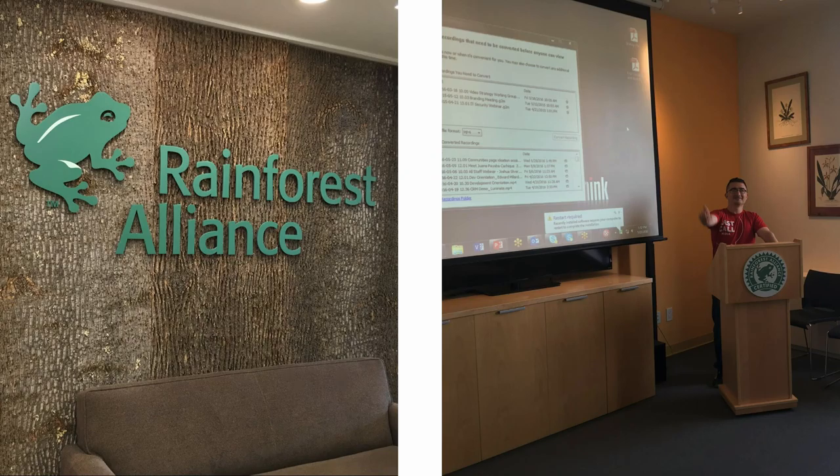So this one's an 8, and it started to align. It wasn't super accurate, and that wasn't the point. The point was that sometimes we'd put one up, and they would say, oh, that's a 40, and he would have written a 4. So it's like, let's talk about this one. Or it could have been the other way. They would say, oh, that's a 4, and we would be like, oh, we put 80.